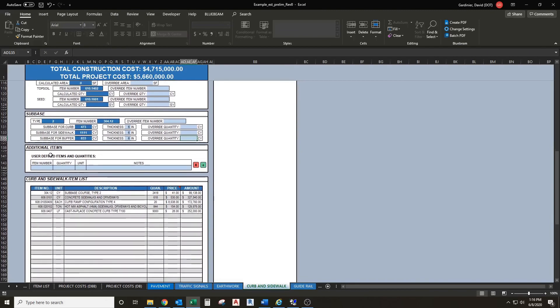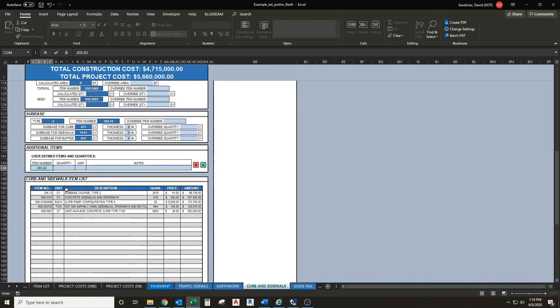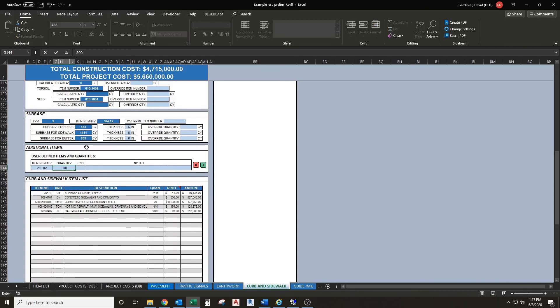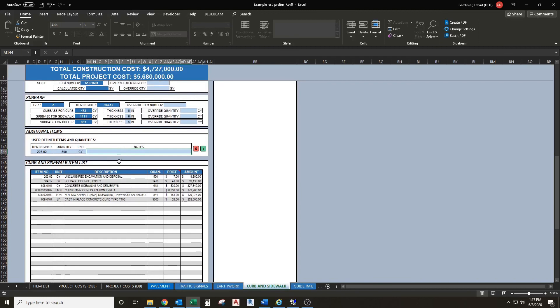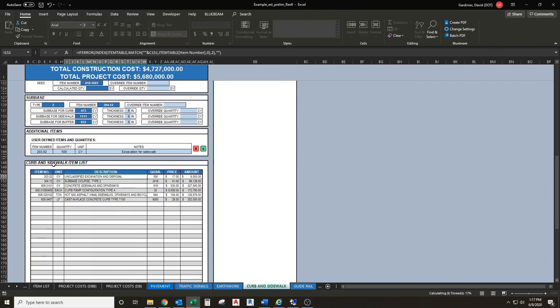Moving on we have additional items, user defined items and quantities, so you can manually enter an item number, quantity and unit, and any notes that go along with it. For example we can put in 20302 here. Maybe we know there's going to be some excavation - 500 cubic yards we'll say - that we want included in our overall cost for curb and sidewalk. We'll just call this excavation for sidewalk. You'll see that shows up in our curb and sidewalk item list.